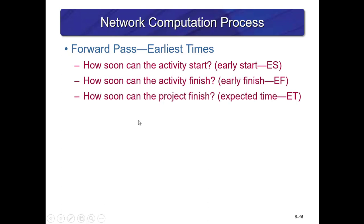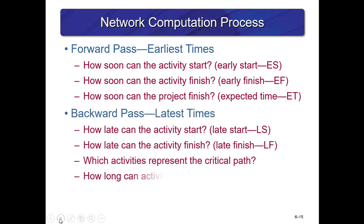For network computation, we complete a forward pass — going from start to finish — to determine the earliest times: ES is early start (how soon can the activity start), EF is early finish (how soon can the activity finish), and ET is how soon the project can finish. The backward pass starts at the project finish and works backwards to the left to determine: late start (how late can the activity start), late finish (how late can the activity finish), which activities are on the critical path, and how long an activity can be delayed — which is the slack or float.